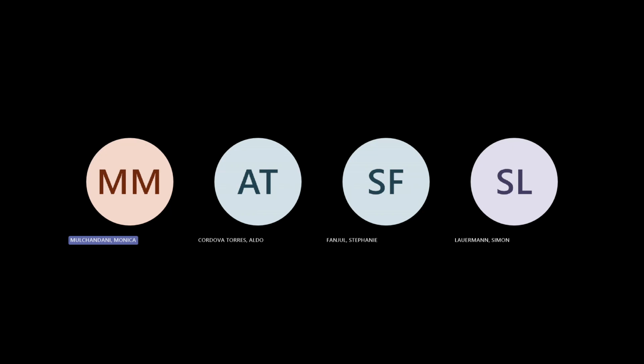For example purposes, PCPS inbox: when a project gets initiated, it comes with a start date. So the project basically has the status PCPS AC, where it says it's been handed over to project controls for pre-scoping, and it started right away. Once they are done, it attains a status of ready to forward because there's another department they have to hand it over to. Whenever there's a handing over action required, there's a ready to forward status saying they are complete with their work and now it will be forwarded to the next department.